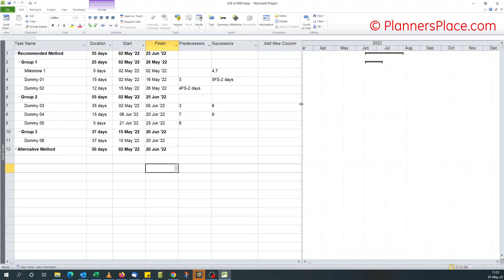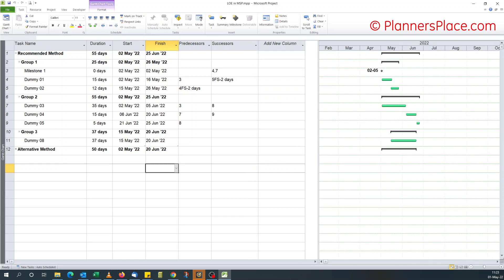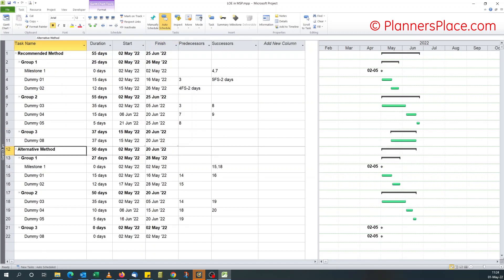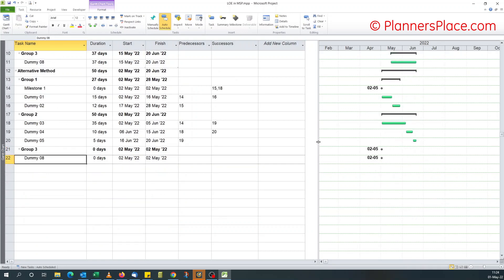In the subsea world, like during offshore installation, you've got very detailed schedules. For example, you've got a utility vessel supporting the pipeline vessel for touchdown monitoring, and we normally maintain those schedules in Microsoft Project. You need a hammock activity to show the start of pipeline on the utility vessel section through to the end of pipeline. The way we do it is using the alternative method. So with a similar schedule, what I'm going to do is introduce two new tasks.